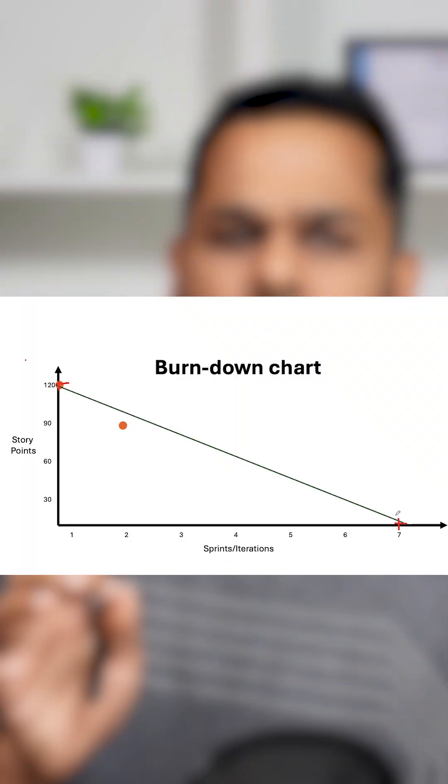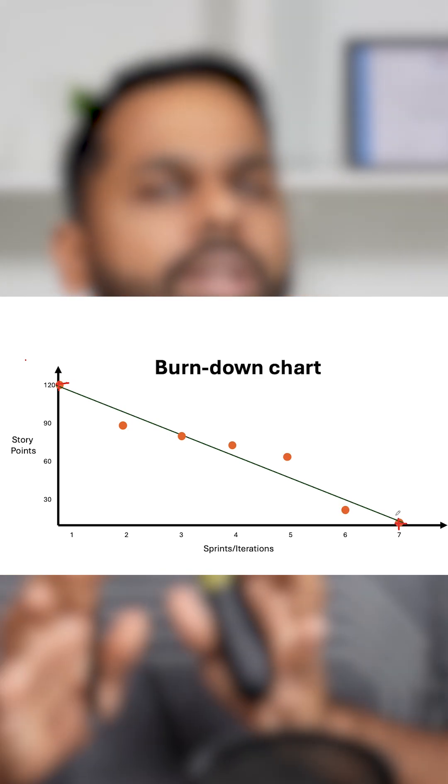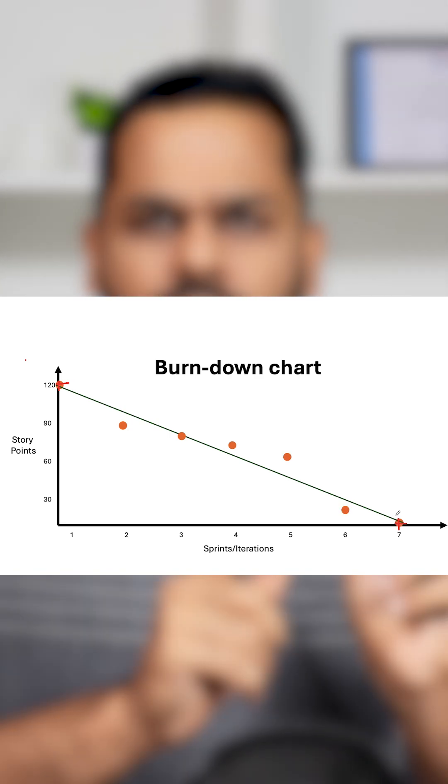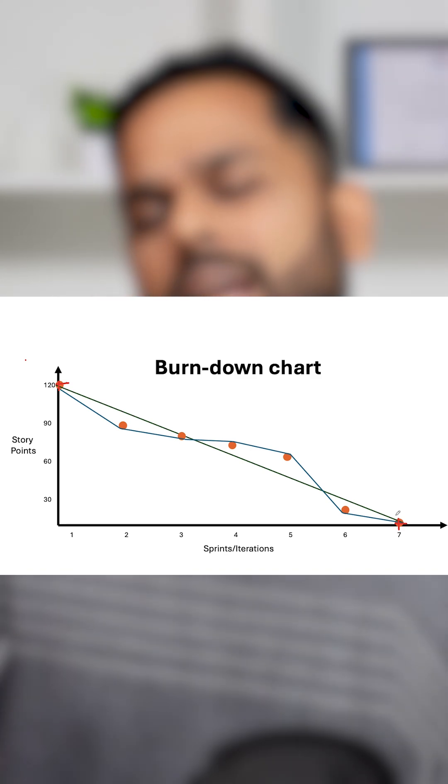Whenever the team completes the work, at the end of every sprint, they would put up on this chart how many story points are remaining. Sprint by sprint, they will show the charts and you will get these particular dots that the team could put. And when we connect these dots, we will get our actual line as well.